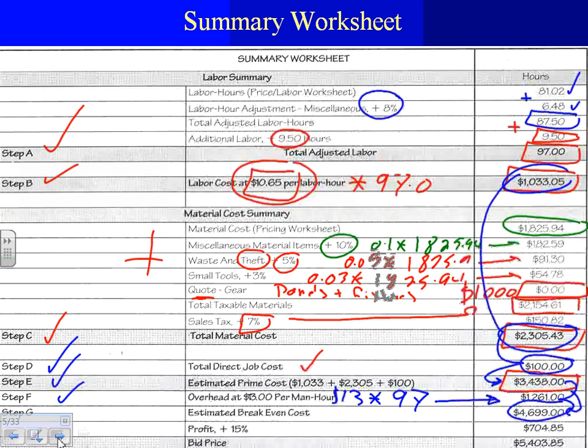Here's where you're going to add your profit, guys, and it becomes the estimate. Now I want to spice it up and add some profit for the owners of the company, even if you are the owner of the company, you want some profit. I added 15%. Look up the 15% on what, guys? On the total. 15% times 4,699.00. This is where this number came from. 15% times the total. End up with, I made close to $700 profit.